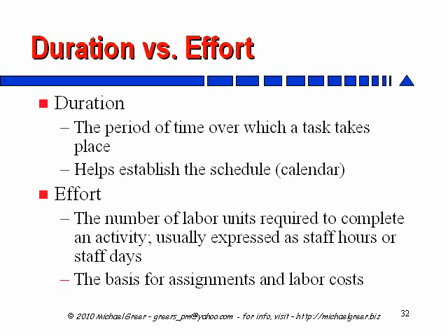So for example, if we are laying a sidewalk, we may have a 5-day project. The first 2 days of the project is digging and laying the rebar and pouring the cement. We have 2 workers working 8 hours each per day. That's 16 hours times 2 days. That's 32 hours. So we have 32 hours of effort.